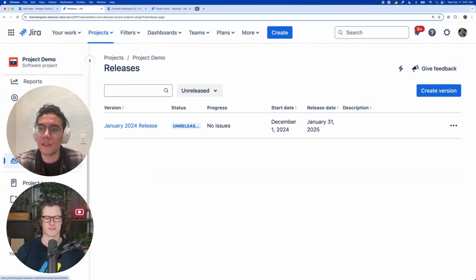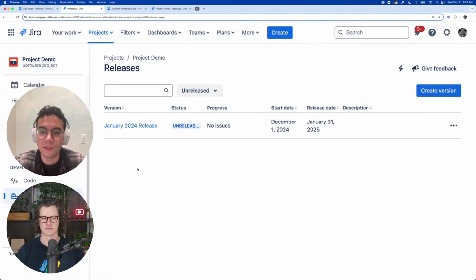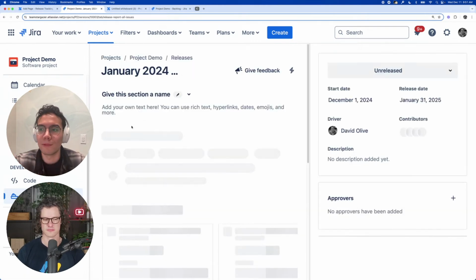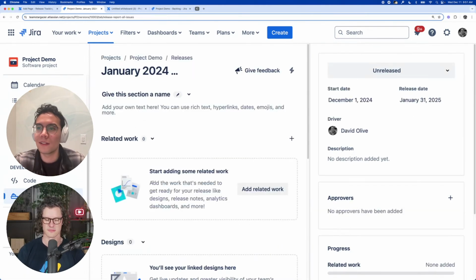And I think the other area I want to quickly highlight is there's a lot of rituals and page creation related to new version releases. We have this view inside of Jira related specifically for development, called releases, that a lot of customers use. This is where you can create a release, and in a release you can say what issues are going to be in it, give a description of the release, what's going to be fixed, what's new coming out, basically outline what's in the release. You can add approvers to the release and track the status. It shows up on other pages like the timeline and calendar view as well. So it helps track when the team is going to be releasing.